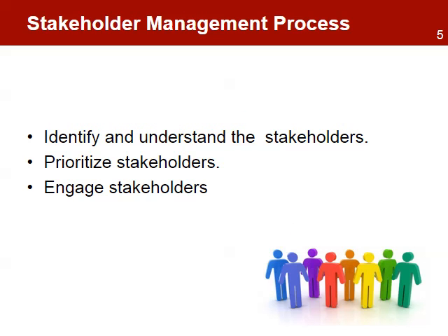The stakeholder management process starts with the correct identification and understanding of all project stakeholders. This list might be different from the stakeholders identified during the planning phase. New stakeholders may need to be included once the project has completed the plans and areas of intervention. There is also the need to identify opportunities for improved relationships and participation with key stakeholders.